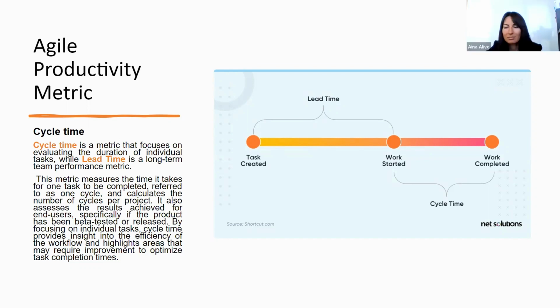Within one team context. Like you might see in our deck, we will not be talking about velocity. We are purposely omitting that because that's a very controversial topic, and it becomes a true vanity metric for organizations because they try to start comparing it, because this is not for comparisons. This is for teams' internal understanding and improvements based on the data they are getting for themselves.